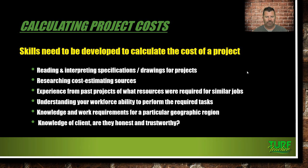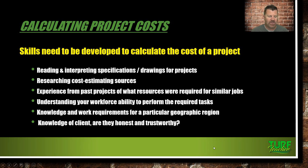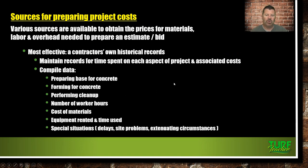Skills needed to calculate the cost of a project include reading and interpreting specifications and drawings, researching cost estimating sources, drawing on experience from past projects, understanding your workers' abilities, and knowledge of work requirements for a particular geographic region. If you're traveling out of state, there may be different labor laws, different plant materials, different stone. For example, in Florida it's hard to get pea gravel and stepping stones because everything has to be hauled in — it costs much more than in North Carolina. To get material prices, just pick up the phone and call your supplier or nurseryman.